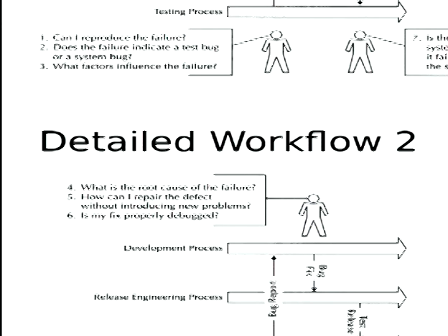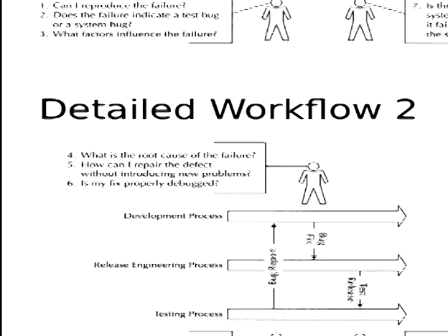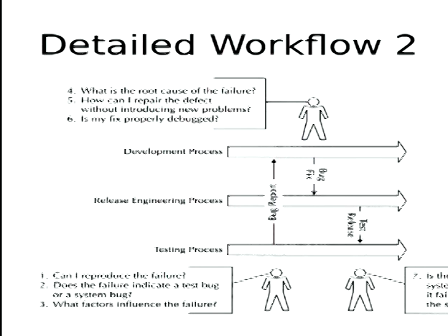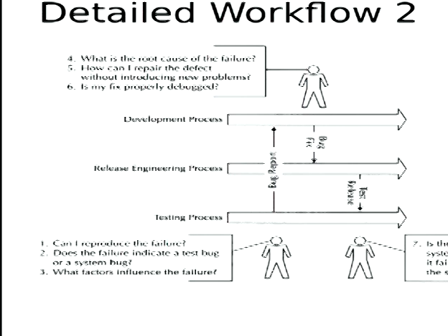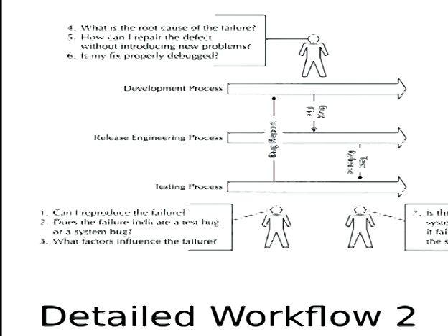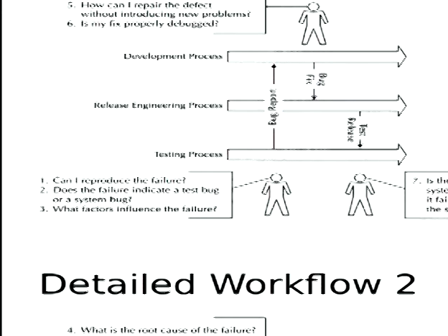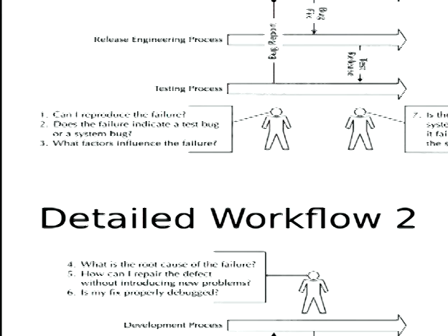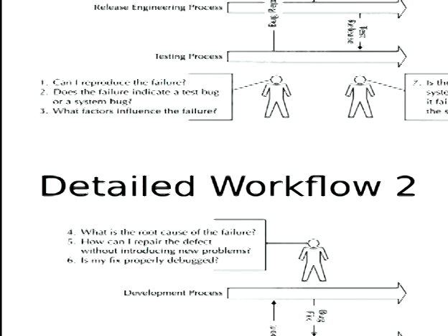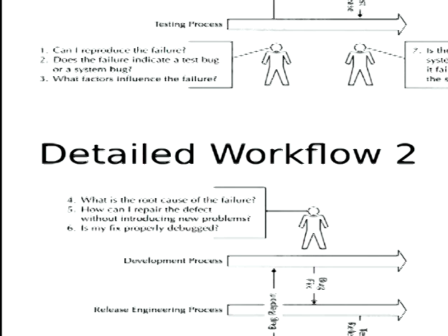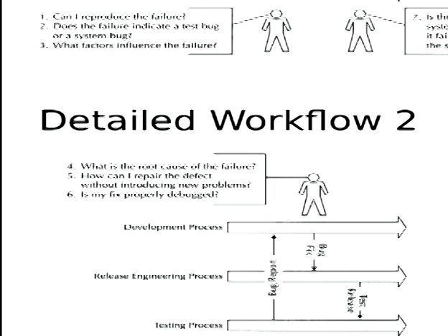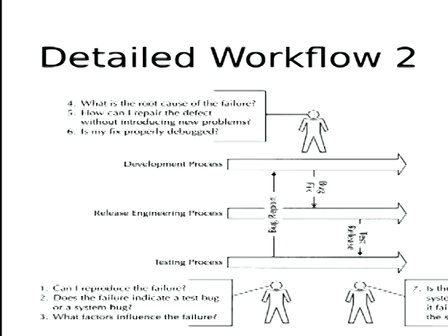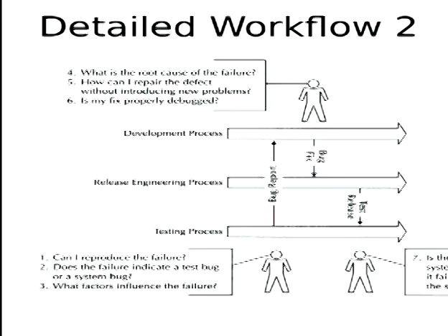They see a check-in. The check-in occurs to Subversion. It's marked as an attempted fix of this bug. And they're informed, okay, this should be resolved in this latest version, this latest release. They could see from the issue tracking system like Jira or Redmine, they see that it's reported as fixed. And so they're going to be checking, is it really fixed? Does the system now pass this test, which previously failed? And does the rest of the system still behave properly? Right? Does this make sense to you as a process?